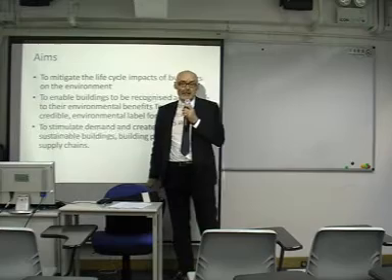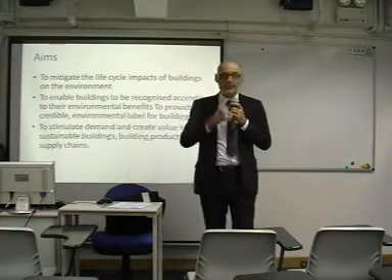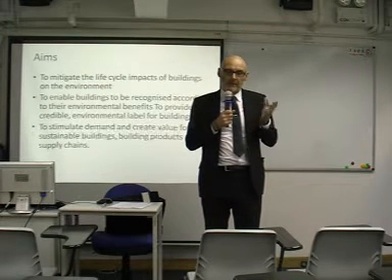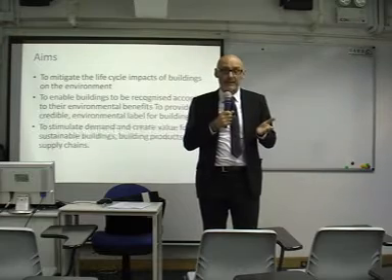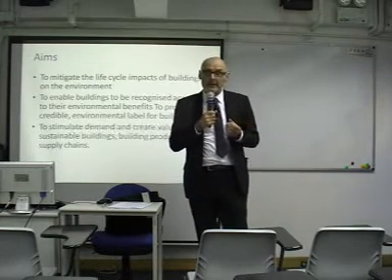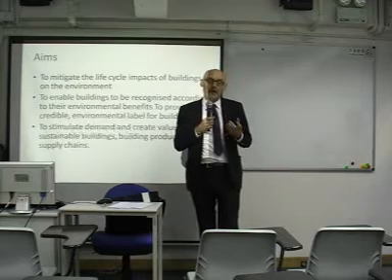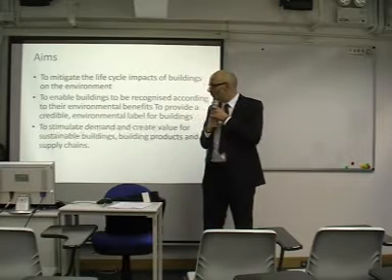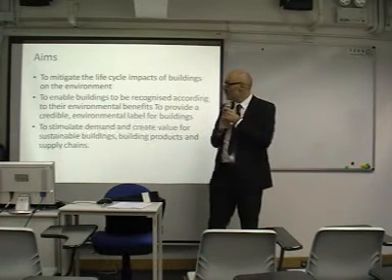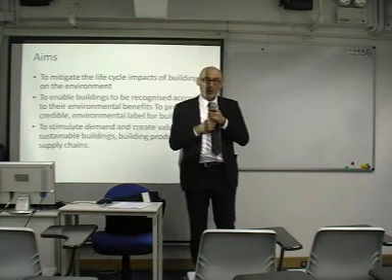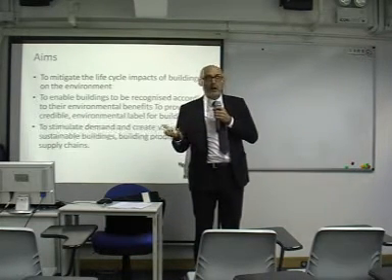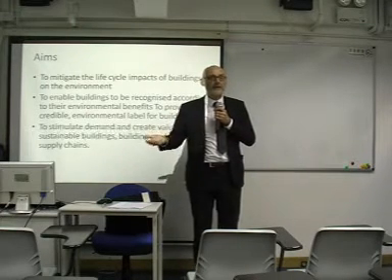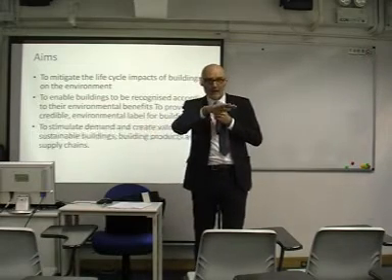One of the considerations is that if you look at the very first case study, the very first exemplar of a public housing scheme 15 years ago, we look at the BEDZ, the Beddington Housing Project. This was the exemplar. They adopted passive housing, zero carbon and renewable energy for that housing development. One of the problems for the BEDZ project was that they couldn't actually get reliable boilers for the biomass feed. So this was a community energy project.